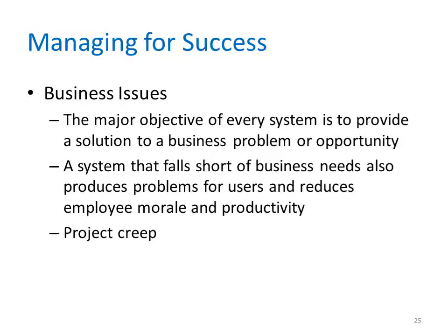One other big issue in managing projects that you constantly have to be on the alert for is project creep. This occurs in a number of ways. Somebody says, oh, well, could it also do this? Oh, could it also do that? And the team wants to say, yeah, we can do that, we can do that. If you're going to add tasks to a project, there needs to be a very definite, systematic approval process. It should be documented, written, and there should be a group that approves all such changes. Project creep is one of the major causes of failure for projects.